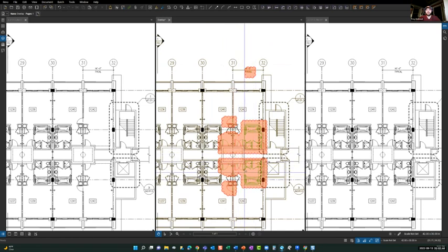So now I have both in one document. We compiled the overlay and the compare in one sheet. So it's kind of cool, you don't have to have those separate. A lot of times in production, I'll pull those together and then save that in the revision folder, so I have a record of everything that changed. But that is the document compare and overlay. I'm going to close that.